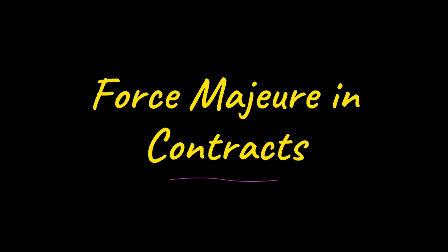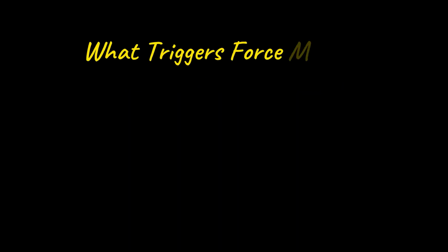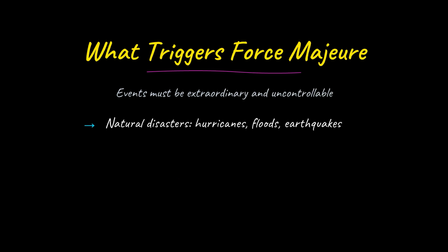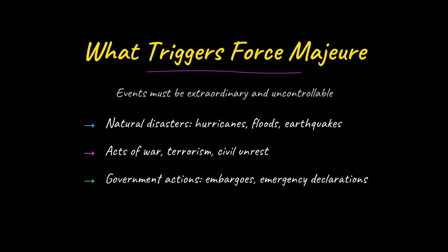Force majeure is a contract provision that excuses parties from performing when extraordinary events outside their control make performance impossible. Understanding this clause is essential for anyone working with healthcare technology contracts. A typical force majeure clause lists specific qualifying events. These fall into broad categories: natural disasters, armed conflict, government mandates, and increasingly, pandemics and major cyber attacks. The clause spells out exactly which events qualify and what consequences follow.